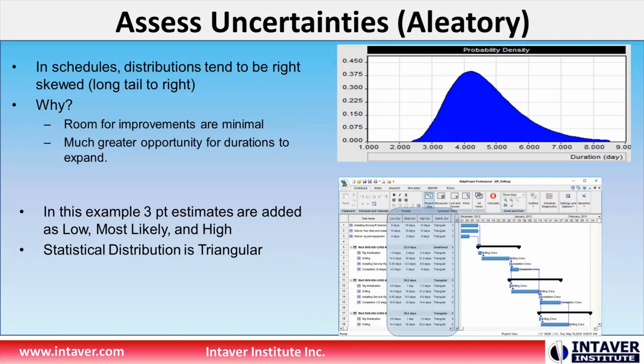We sort of say you can use triangular as the good enough one unless you have information to support another type of distribution. The thing about a triangular distribution is they tend to put a bit more weight on the boundary values. So rather than long skinny tails, you get a bit thicker at the ends.